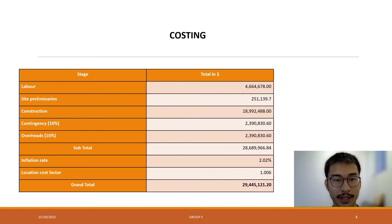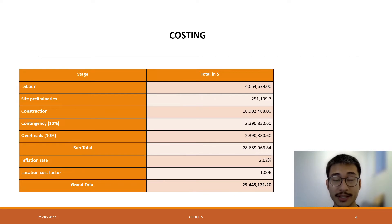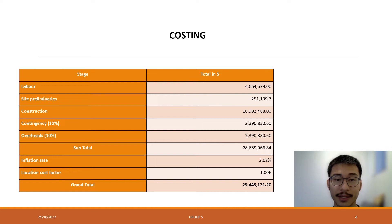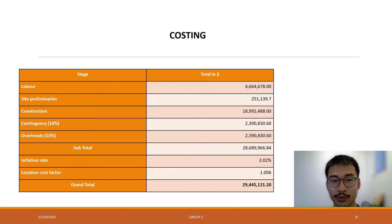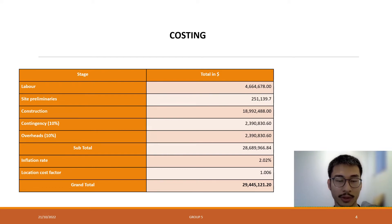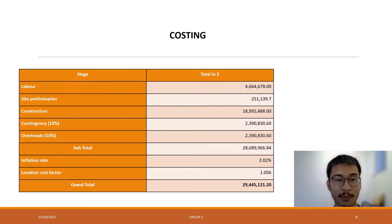Estimated costing of this project consisted of activities from the construction phase to handover phase, and also the liability period for defects and immediate maintenance. The main cost breakdown components were estimated and listed in the table shown in this slide. All sub-costing strictly followed the Cordell Commercial Building Cost Guide 2020. An inflation rate of 2.02% and a location cost factor of 1.006 were applied to estimate a grand total of nearly 30 million Australian dollars for the whole project. A contingency of 10% was applied to both profit and overhead to accommodate unexpected events that potentially delayed the project timeframe.